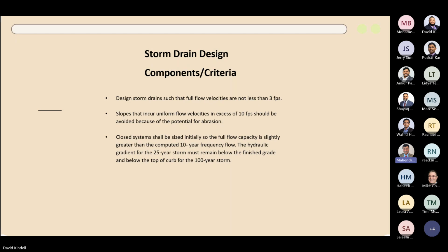In Swan Harbor DMP site, we just completed 1,300 linear feet of pipe video inspection within $5,000, done by an AV consultant. What they do is send a robot with 4 wheels and a camera in the head.